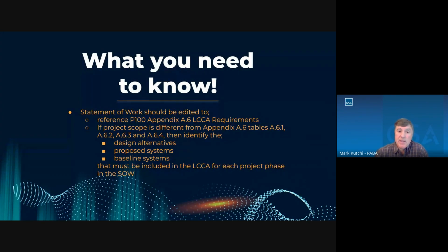Okay, so what you need to know, the statement of work template should be edited to reference the P100 Appendix A6 Lifecycle Cost Analysis requirements. Currently, the statement of work templates do not reference any lifecycle analysis requirements, so it's important to edit those statements of work to reference the appendix.